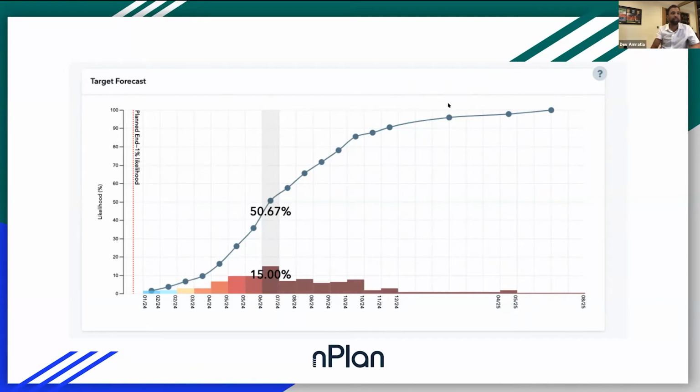So when we talk about bidding for realism, one of the things that we've been doing with one of our clients in Canada is talking about, well, the contractors have submitted a schedule to you. Do you know what likelihood the contractor has of delivering this project on time? And these are fixed price contracts. Where are you going to award the fixed price contract to? So right off the bat, if they award the fixed price contract to the planned end date based on this graph, the contractor has no chance of delivering the project on time, or 1%, right? So call it almost no chance.